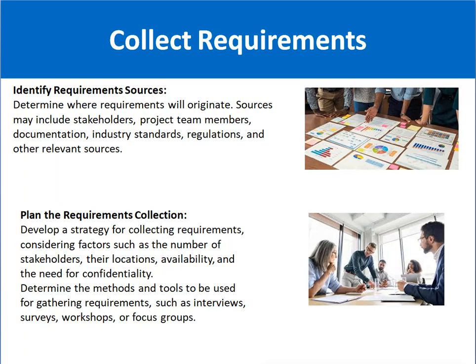Sources means you have to identify from where you will get the requirements of the project, what actually we have to deliver, what the customer actually wants. For example, sources may include stakeholders from the customer side, project team members like the software development team, the QA team, etc., the documentation already available, the industry standards, regulatory requirements, and other relevant sources.